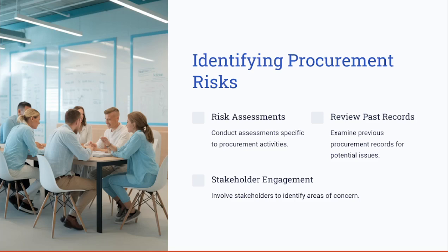So all of the risks that you or your team have dealt with previously when conducting other projects might be documented as part of the risk management plan or the issue log that the team has created. In case you have faced any potential issues during other implemented projects, you need to refer to that to put mitigation strategies in place for how to handle these risks with the same supplier. Also ensure engaging the stakeholders to identify any areas of concern.